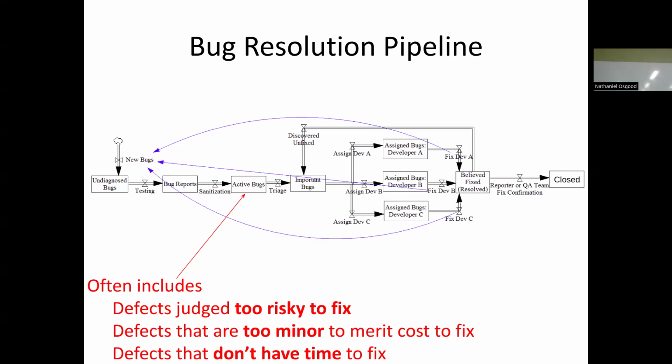This can cause defects, new defects, right? So regardless of whether you fix this particular one, there can be defects created by fixing it. The statistics on this are not very good. I think it's somewhere around 20 to 30% of defect fixes involve fewer than 10 lines of code.